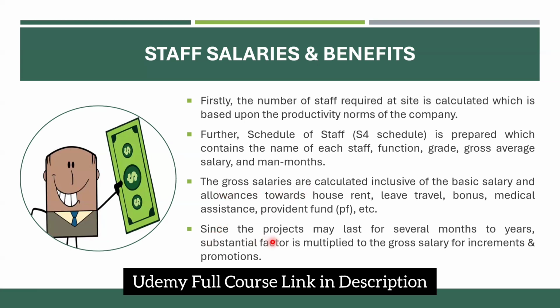Since projects may last for several months to years, a substantial factor is multiplied to the gross salary for increments and promotion. You cannot take the specific salary as of now. Suppose the project is of 5 years, then whatever salary you take has to consider the increments and promotions also. In 5 years, one particular person may get two or three promotions depending on company policies. You have to consider some factor by which you will multiply their salary, which will contribute to the increments as well as the promotions.